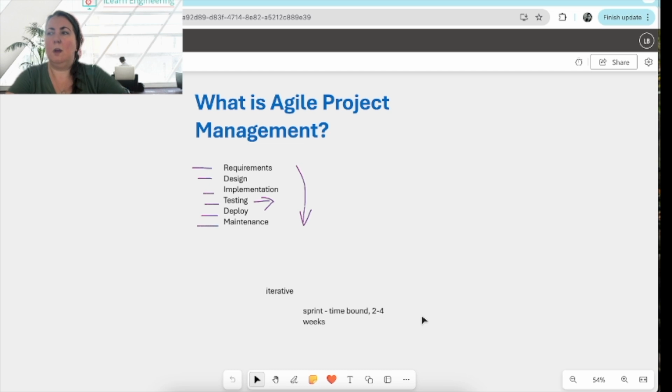During the design phase, the project manager will work out for each requirement how long that would take. Does it take a day? Does it take 2 days? Does it take 2 weeks? Can we break it down into smaller requirements? What does that look like? Then at the start of a sprint, we'll have a sprint planning session, and we'll look at how many people are in the team, what is their skill set, and which requirements are the highest priority for the client at this point.